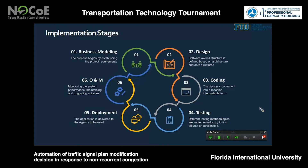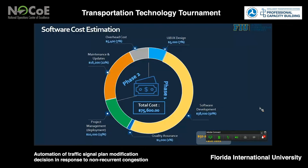As of today, we have already completed three steps of phase one: the business model, the design, and the coding. However, due to the COVID-19 situation, we have experienced some delay moving to the quality assurance step and completing phase one. Regarding cost estimation, phase one has a total cost of $54,000, with $38,000 allocated to software coding, representing about 50% of the total project cost. Phase two has a cost of $21,600, including overhead costs. This gives a total cost of $75,600 for the entire project, based on a $50 average hourly rate for coding development.